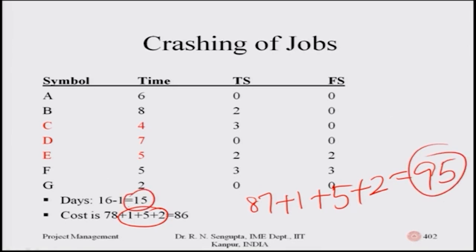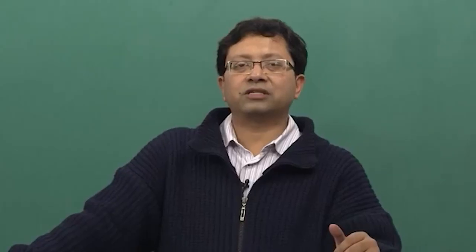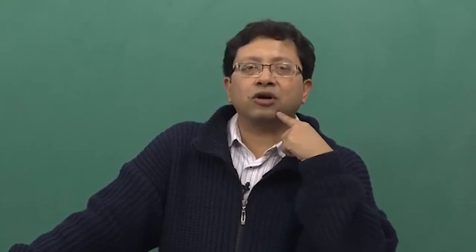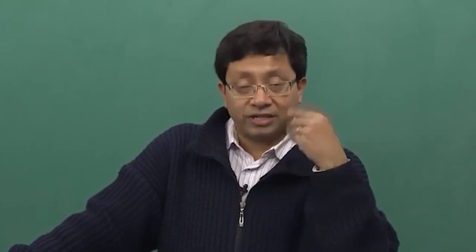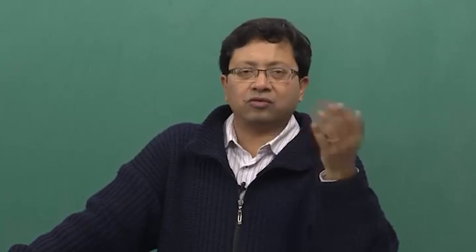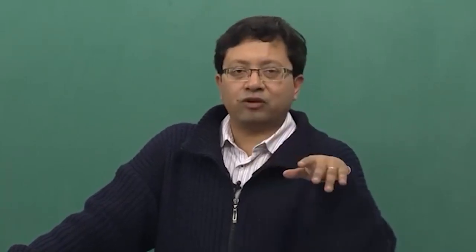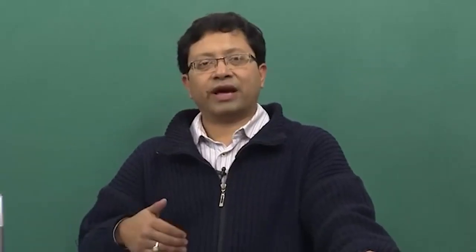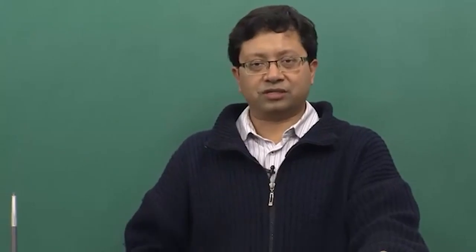Costs have increased from fifty-five to ninety-five units, and project duration has reduced from twenty-two to fifteen days. You must balance this cost increase against the overall profit or revenues you expect to generate on different accounts. If that balance is favorable, you analyze the total project in the simplified manner we just discussed.